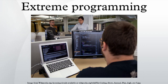If the requirements for one area of code change through various iterations, the same programming may need to be done several times over. Whereas if a plan were there to be followed, a single area of code is expected to be written once. It is impossible to develop realistic estimates of work effort needed to provide a quote, because at the beginning of the project no one knows the entire scope of requirements. It can increase the risk of scope creep due to the lack of detailed requirements documentation. Agile is feature-driven. Non-functional quality attributes are hard to place as user stories.